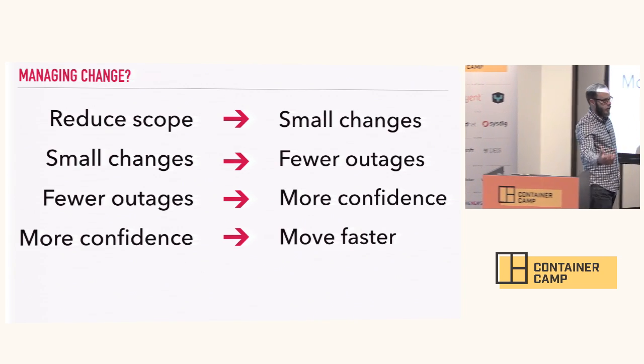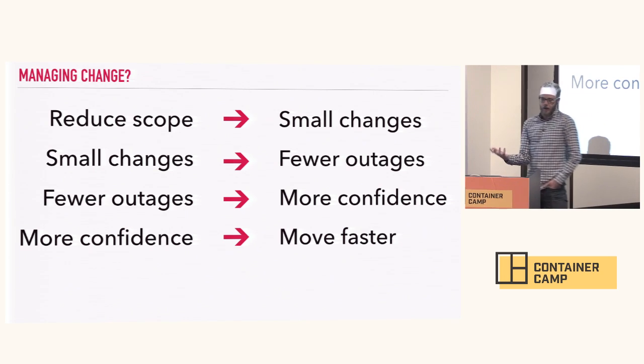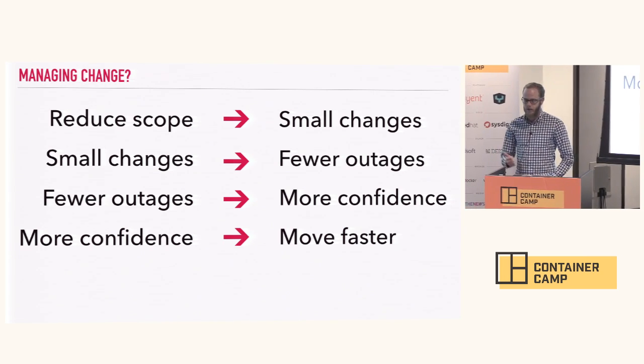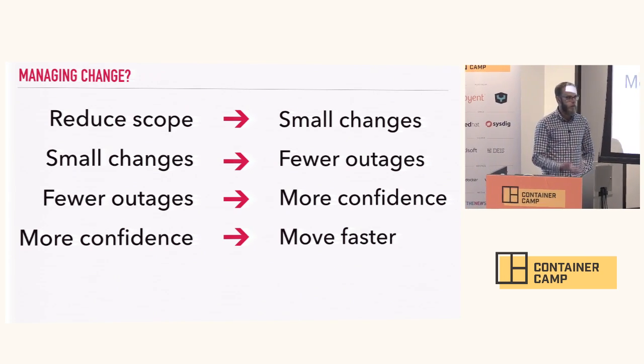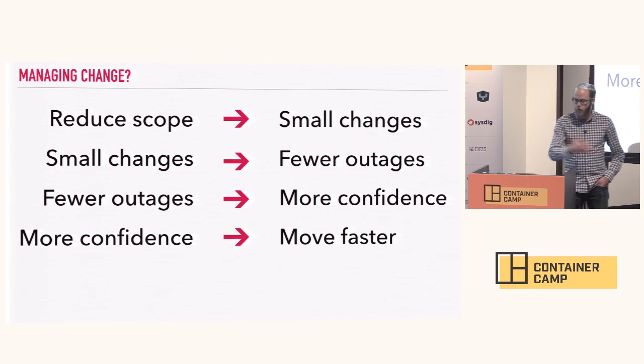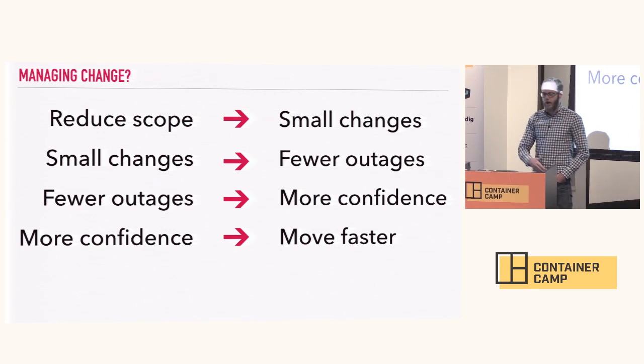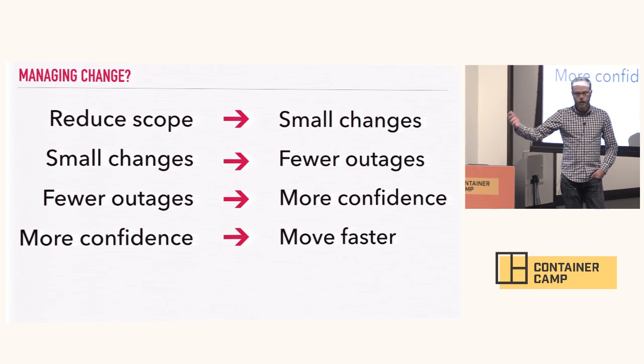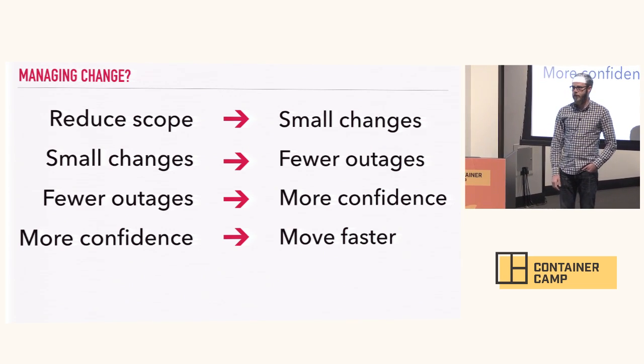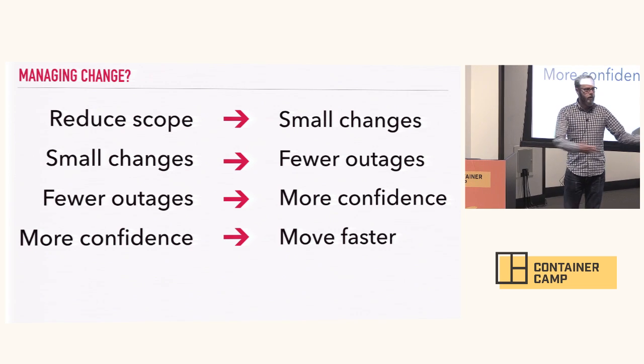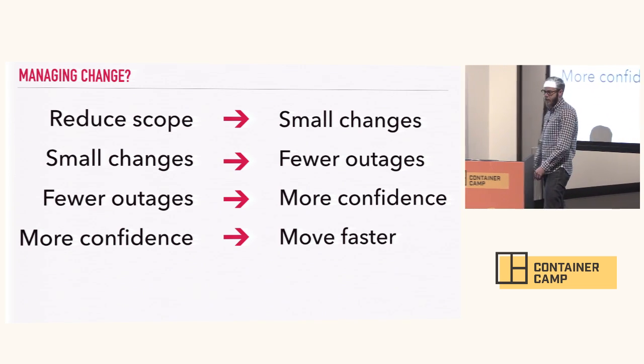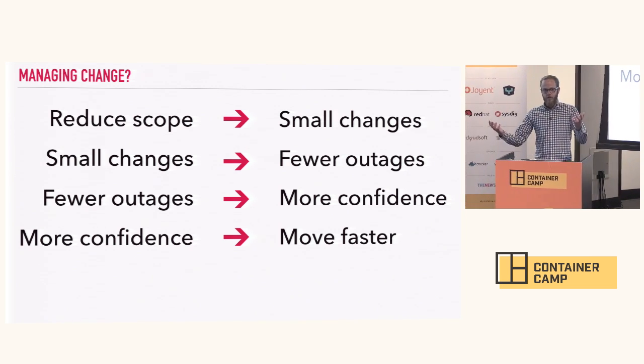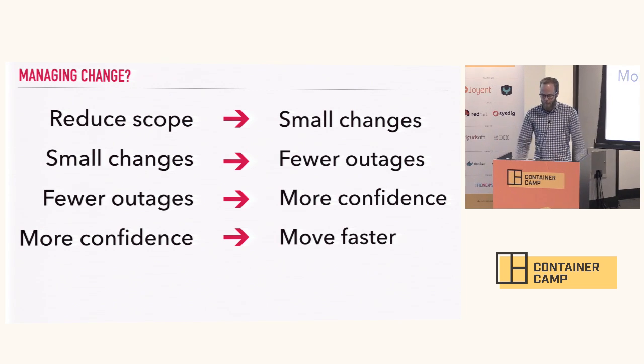So how do we manage change? You can manage change by doing a couple of different things. The first option is to reduce scope. You reduce scope, it's a smaller change. Smaller changes lead to fewer outages. Fewer outages lead to more confidence. More confidence leads to being able to move faster. Sounds a lot like the Agile manifesto, but we'll talk about it in terms of systems.